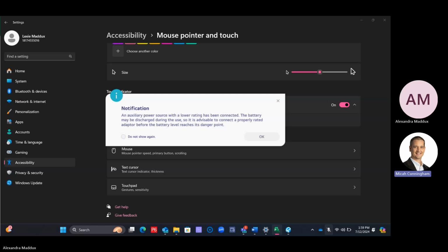Basically, you can copy and paste sections, but I would recommend collapsing it first, because sometimes it'll change around your logic ties if you don't collapse it first, depending on what settings you have selected. If you copy the whole section collapsed, and then I scroll down here and paste it, now I have the whole grade work section that I can put in my other area.